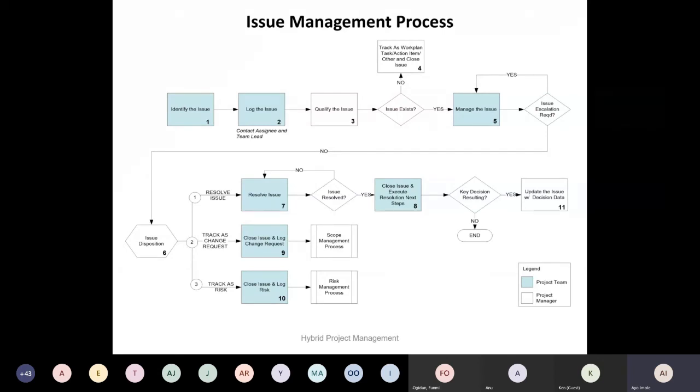One of the best ways to manage it, like I said, is to set up a meeting. Just say, why don't we have a risk workshop, or why don't we discuss this? As a PMO, while you're setting up the agenda for the next meeting, put it there: risk discussion. We'll be discussing these risks: risk 1, risk 2, risk 3, and put the hyperlink of the log on your shared drive so that everybody knows ahead that we'll be discussing this. That is a very good forum where you can discuss or escalate these to people, because everybody is there. You're not just picking out one person to escalate to the upper part, but discussing it together. Okay. Any other question?